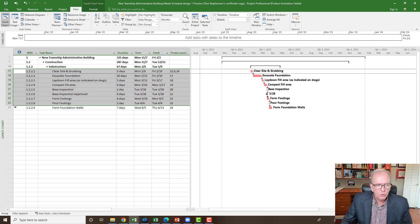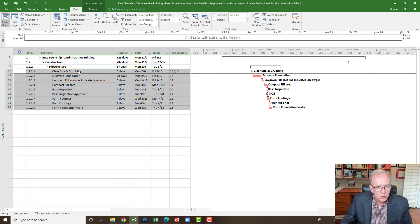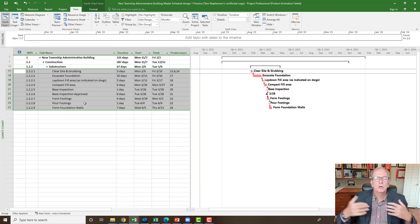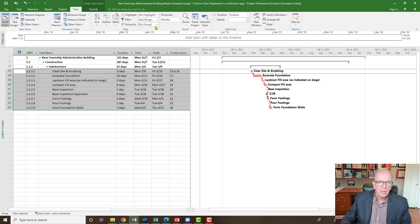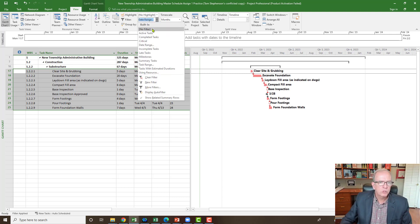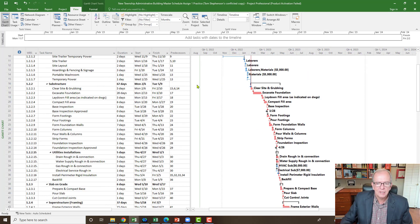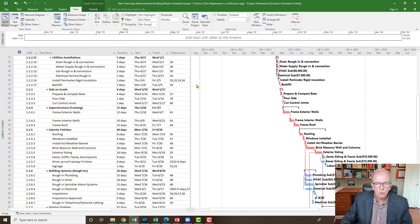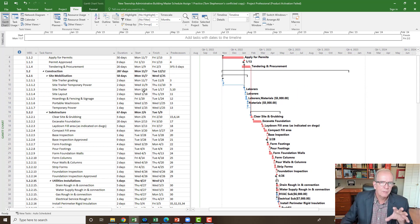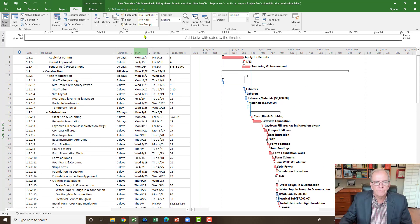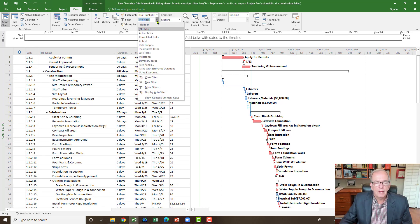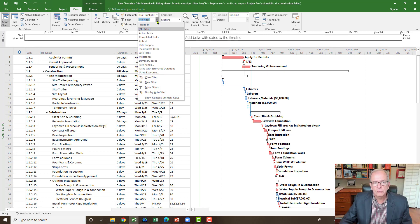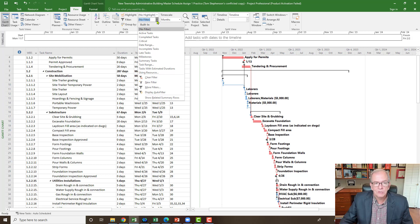And that's great. So I can look at what's coming up during that time period. And if I'm going to detail out a look ahead schedule, I know that these are going to be coming up. And then I can work on getting more detail on it, which is helpful in selecting parts and portions of my projects. Because I probably, at certain times, I don't want to be looking at something that's way, way out into the future. I want to detail in what's coming up so I can really flush that information out. So that's helpful if I have that. And I can do that every time I do my look ahead schedule. I can also do that when I'm updating the schedule for a particular period of time. Then I could just look at what's coming up.